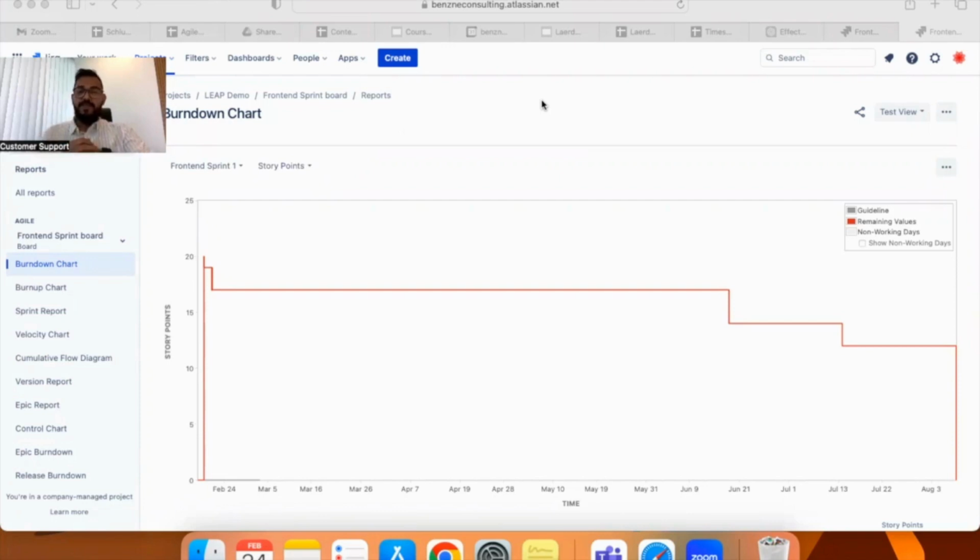A daily stand-up meeting is a ceremony which we do every day for 15 minutes in a sprint with all the team members. The intention behind doing a daily stand-up meeting or daily scrum meeting is to identify or to visualize the progress we made with respect to what we had planned in the sprint planning meeting.